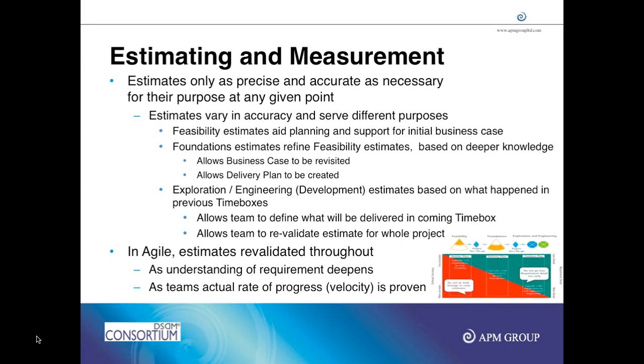So you have 600 divided by 30, so you have 20 time boxes. Each time box is 4 weeks, so 20 into 4, you have got 80 weeks of project. 80 weeks divided by 4 weeks a month gives you 20 months of project, which is more than a year. So it just gives you a starting point, based on my previous experience, on how we perform in this company, and the team dynamics.